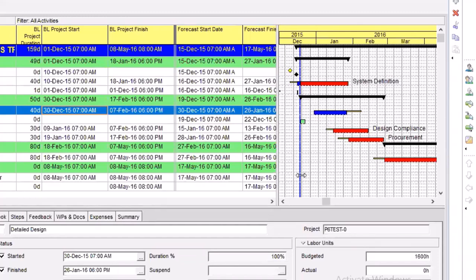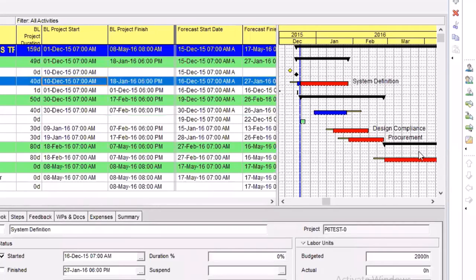This line is your status date. This line is your status. So anything from here front, anything from this line, this blue line, this way is future. From this one back is present. So you have a present delay already, although it has been executed, but it was executed in delay. So that delay now, this one, is what is reflecting on these ones. Although this one was done earlier, but these ones are having that challenge right now.